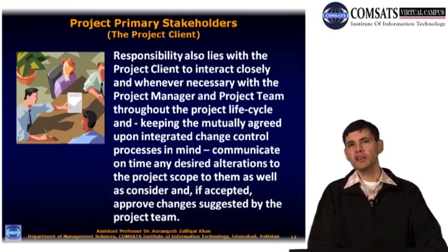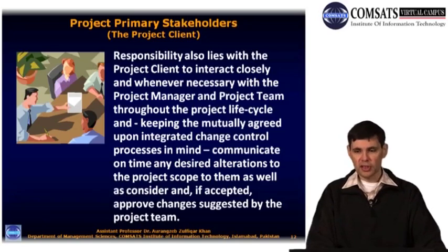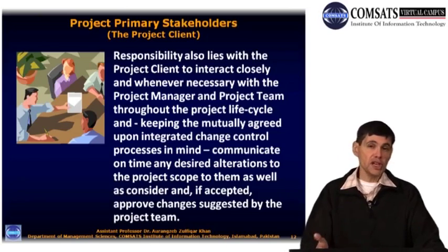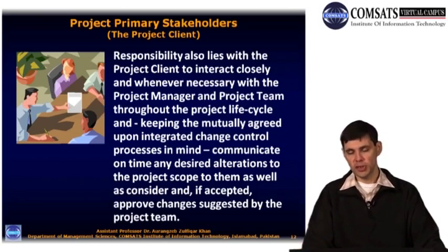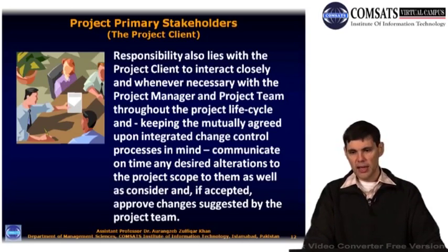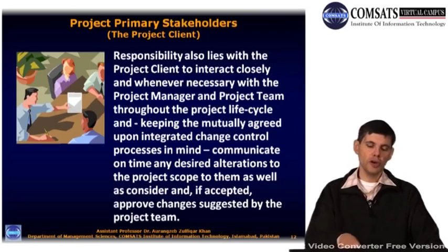And that is why there has to be a mechanism which can take into consideration and incorporate this need for change. And that is the integrated change control process, which is basically very simple, but there are a number of steps which you have to keep in mind. And sometimes changes can be numerous, sometimes they can be quite infrequent. So it is the project client's responsibility to propose any changes based on changing needs of that client or changing requirements, changing specifications. That is the client's responsibility. And they have to communicate this to the project manager and team. They have to look at the proposed change requests, and then they have to consider them.